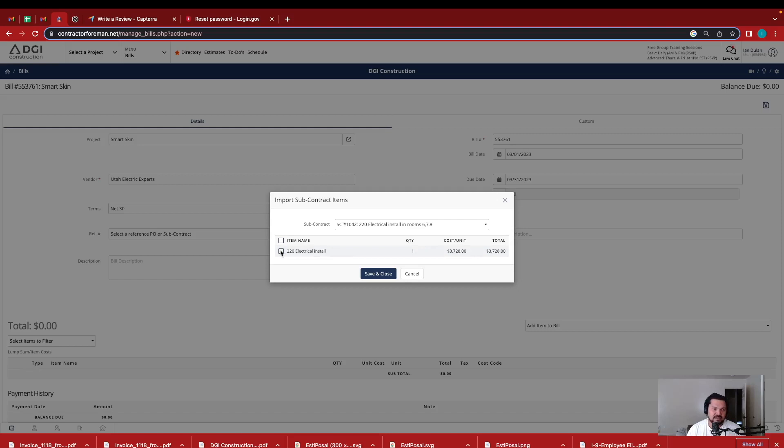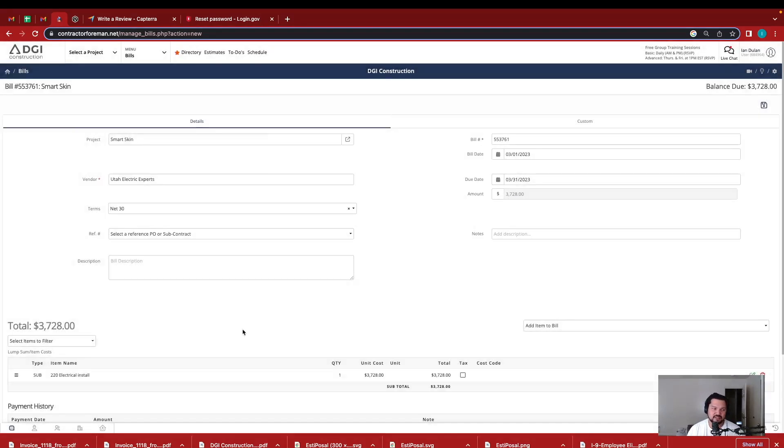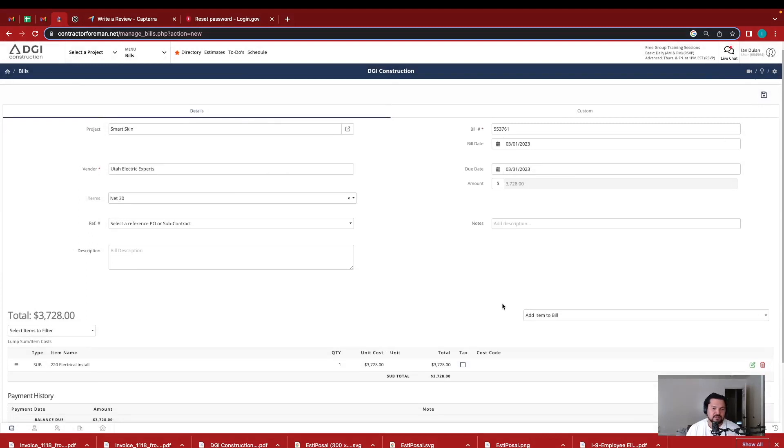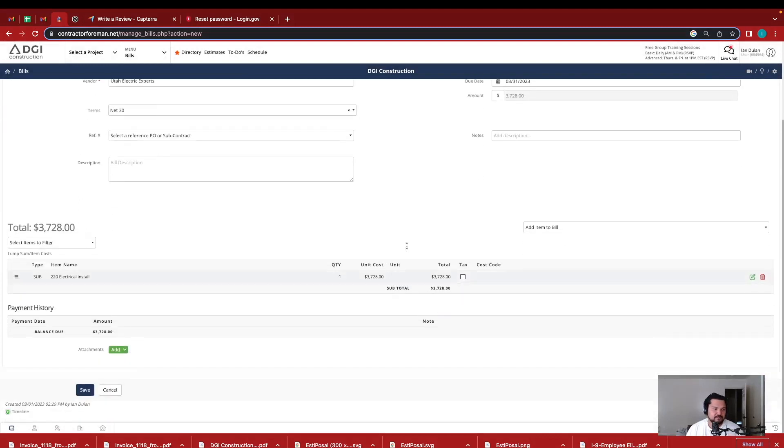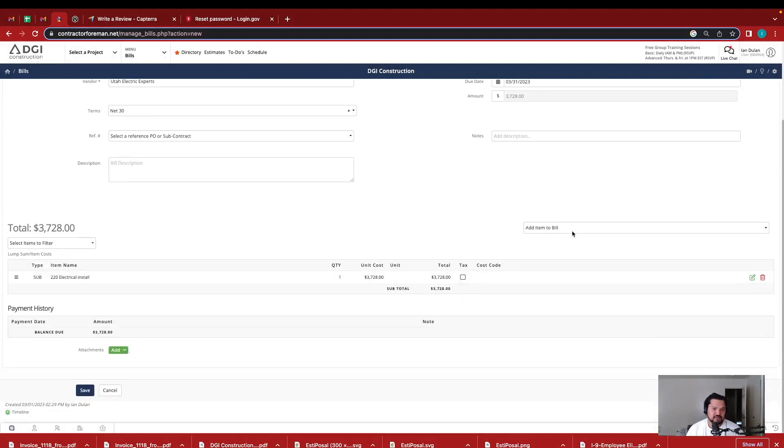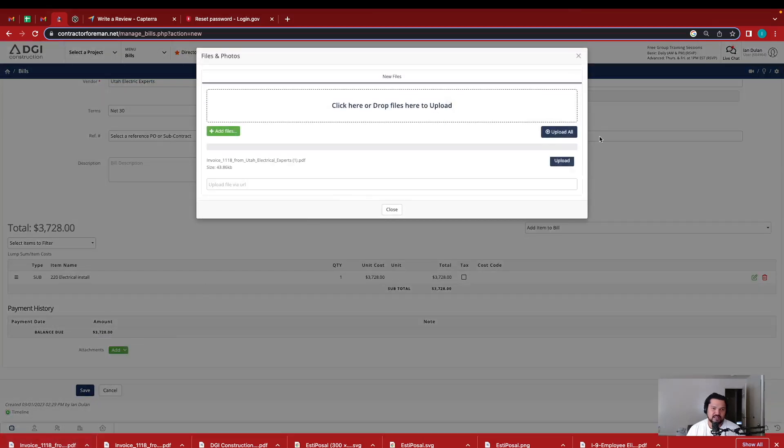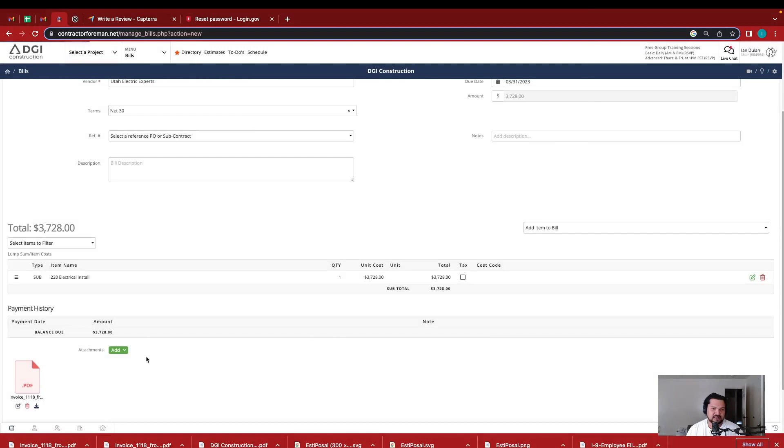So I highlight this is the actual cost, $3,728, and that's what he billed me in the invoice. So I pull that in from the subcontracts. And then I always like to add an attachment and then put in the invoice that he had submitted in a PDF.